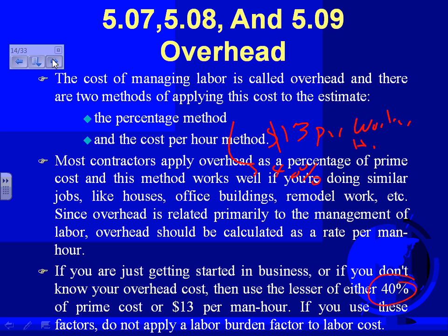You're going to minimize. If your overhead is 40, that's really high. At the minimum, if I have to give a number, I probably would say 15% or less for your overhead. The more you minimize, how do you make your overhead low, guys? By making everything billable to the project. Meaning there are no people sitting around doing nothing. If you have people in the office, they are billable to the project directly.